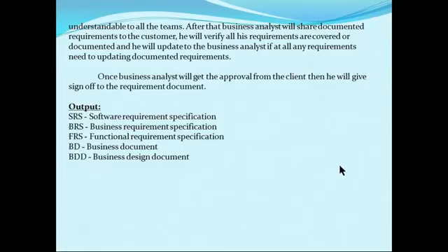So the business analyst will share the requirements document with the customer, as I told you. The customer has to verify that all his requirements are covered and documented, and will tell the business analyst if any requirements need to be updated. We'll send one copy to the client. The client will verify it. If any modification is required, he'll request them to modify. Once the business analyst gets approval from the client, he'll give sign-off to the requirements document.